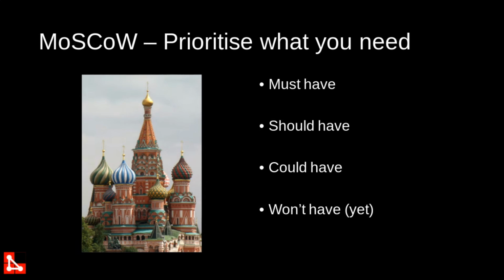So it's always good to have in your project enough of the elements that, well, the should haves, they bring you value. So they actually usually are mistaken as must-haves. They're not all of them, but they deliver value, so you should really do them. But a lot of the could-haves, it's good to do anyway or plan for them because that budget you can then swap for something that comes in unexpected or on issues that take longer to fix.